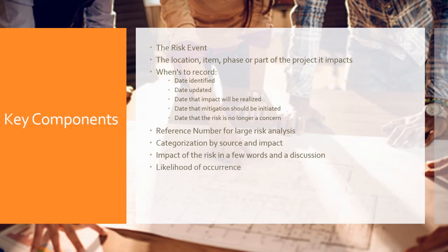How likely is it to happen? Even a ballpark probability is useful. High probability risks, of course, should be addressed, and these will be used to prioritize. It is important to prioritize because we do not have limitless resources, time, manpower to address all of the risks. So we address only the risks with the highest impact and risks with the most likelihood of occurring.